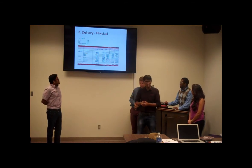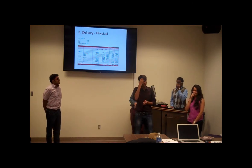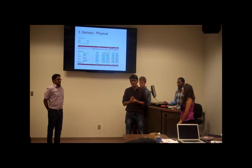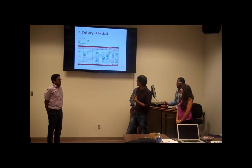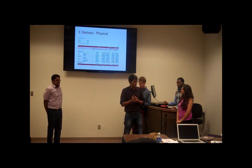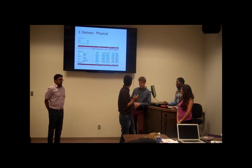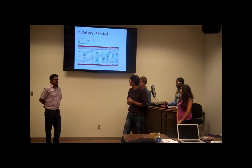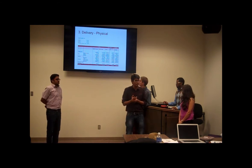Coming to the cost, our entire construction cost is going up to 13.9 million. Individually, each phase, our first phase is around 7.5 million. We concentrated more on the educational facilities in the first phase and some of the student housing facilities. And eventually we've developed the housing and the other activities which are more relevant for the education institution. So totally it is coming up to 13.9 million.